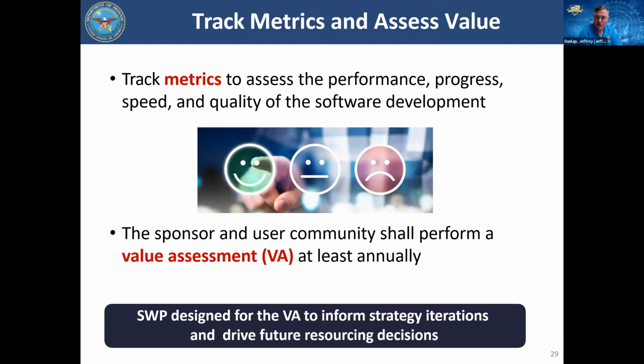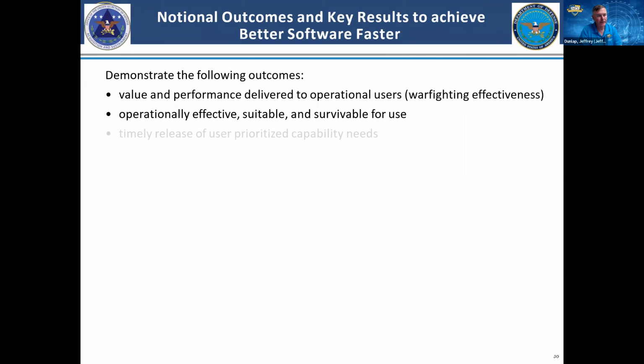The sponsor and the user community, if I'm following this pathway, shall perform a value assessment at least annually. So the customer is going to assess us in acquisition. Are you delivering value to us? That's different. That's never been done before. The customer has never had a say during the development of the system on whether you are adding value or not. If you're not adding value, then you're probably going to lose your funding, and they're probably going to cause you to terminate. So this is tied to funding resources, right? If the sponsor, who is paying the bill, is not happy and you don't seem to be adding value, then they may just change your funding profile. This is a big build out.